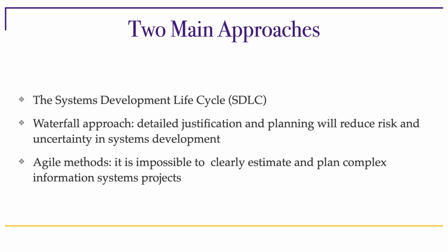And we're going to put the effort not so much on locking in the requirements early, but instead on leveraging tools that allow us to develop quickly and engage the customer to see the results of this development and comment on that, and use that fast cycle of iteration of requirements, building, testing, more requirements, building, testing, to refine the quality of the requirements.